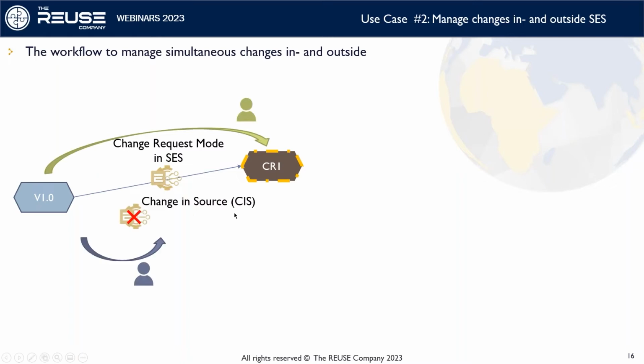When it is coming from outside, it's not qualified as a change request automatically. You have to go through an intermediate state in which the administrator will decide if this is becoming a change request or not. So all the changes that are not considered valid as a change request, either because we know that it's already been suggested before, or because we don't consider it relevant, we can discard.